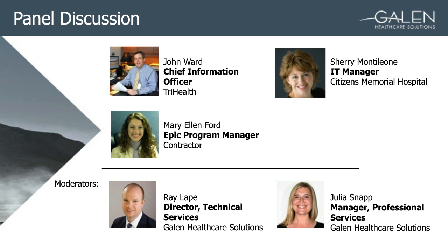So the challenge was getting your arms around all that and knowing who you needed to have on your team that could access that data. Let me tell you about a lady down in Madisonville, Kentucky, who was thinking she was going to retire, although they had to have some conversations with her because she was literally the only resource for McKesson Star at that site. So they worked out a plan for her to work a couple of days a week to help us until that facility was live on Epic. So that's just an example.